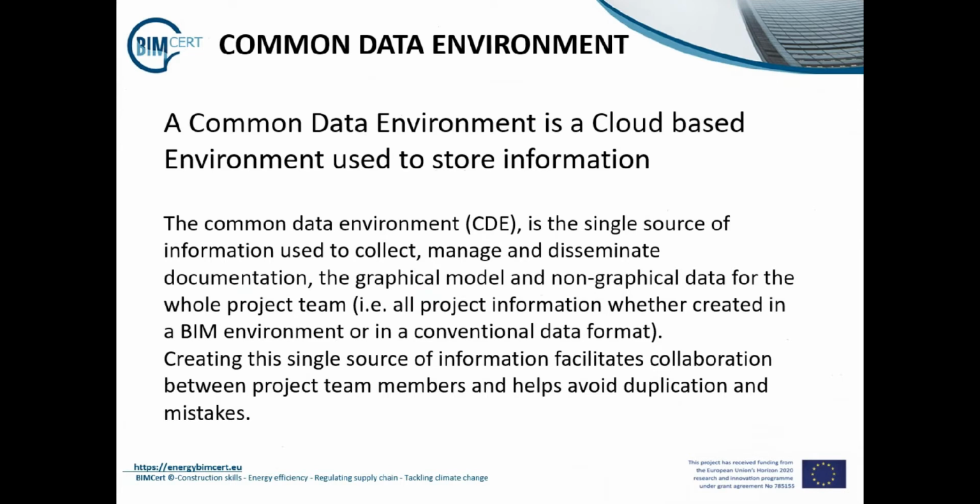With an understanding of the cloud as well as web apps now gained, let's now look at what a common data environment means within this context. A common data environment is a cloud-based environment used to store information. The CDE is the single source of information used to collect, manage, and disseminate documentation, the graphical model, and non-graphical data for the whole project team. Creating this single source of information facilitates collaboration between project team members and helps avoid duplication and mistakes.